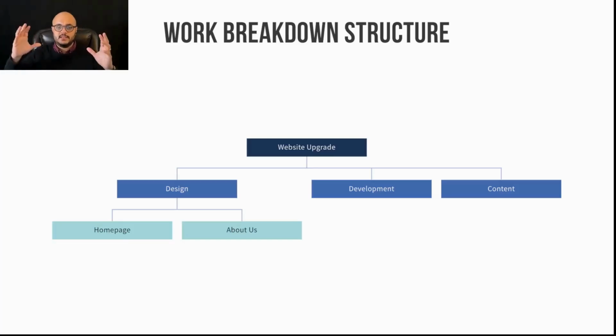Okay, for me to design, what do I need to do to complete that design activity? Well, I need to design a homepage and an about us page. So you keep breaking it down. Now be very careful. It's a fine line of how detailed your work breakdown structure is. If it's too detailed, it's too broken down.